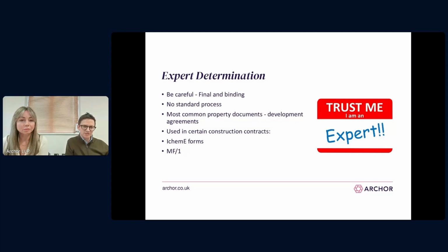The expert determination process is that the parties will exchange written submissions or evidence, not dissimilar to adjudication. There might also be a site meeting or a site visit, especially if the adjudicator needs to see a certain piece of kit on site. And then the expert will give their final and binding determination.